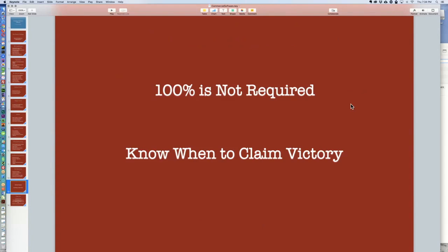And again, with all of these other pieces, if you've got a release schedule, if you've got a roadmap, if you've got your change control and your ticketing system, all that stuff can be in there so that you'll be comfortable that, yes, I've released this today, but I know that a month from now I'm going to do another release and I'm going to have these extra features in there. And it saves you from just constantly going back and saying, oh, no, I've got to get this in. Nope, I've got to get this in. And your feature bloat and your scope creep just keeps on going and keeps on going, and you never actually cross the finish line.